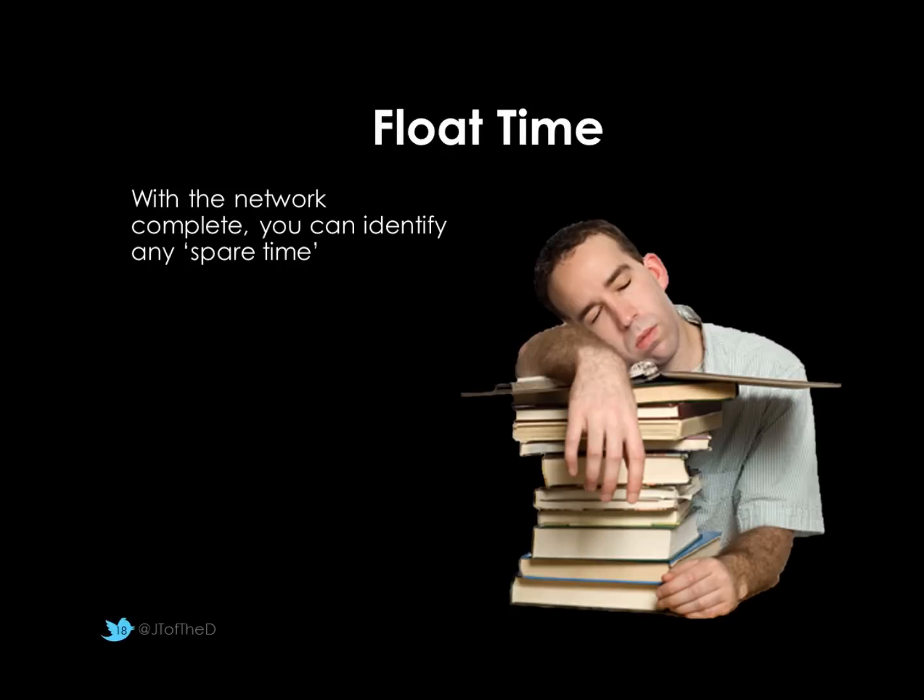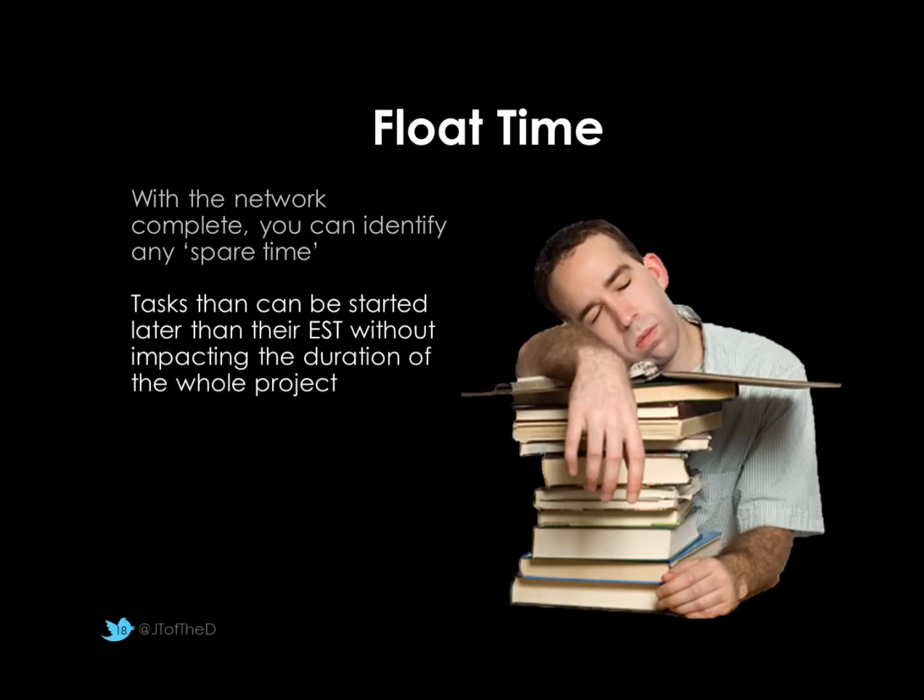There's something called float we need to consider. Now float is any spare time that we might have in our network. Some tasks can be started later than the early start time without impacting the whole project. If you remember earlier, my friend coming from Stanmore only took him 20 minutes, he left at 6 o'clock, he'd be there by 6:20, and everyone else wouldn't have finished arriving until 6:55. So it was actually 35 minutes that he'd be hanging around.